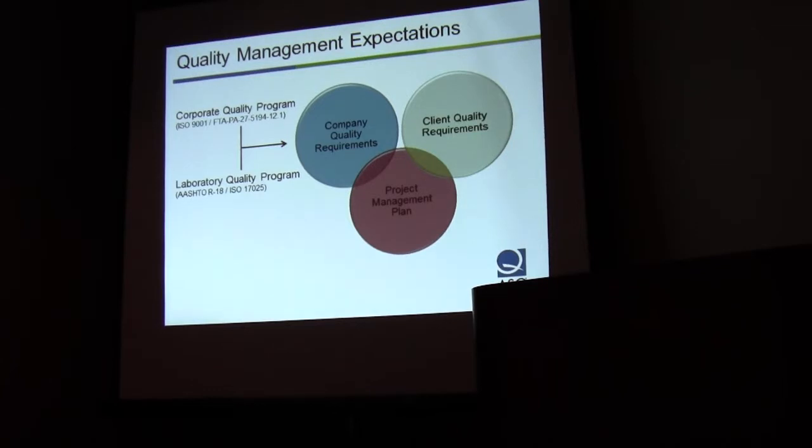Kleinfelder works directly for the Charlotte Transit System. As we were looking at this project and trying to figure out what quality requirements we have to meet, we came to note that there were several areas we had to take into account. One, we have our own company quality requirements. Kleinfelder, for its corporate work, runs to an ISO 9001 compliant program. But then we have to add to that our testing laboratories and our inspection services.